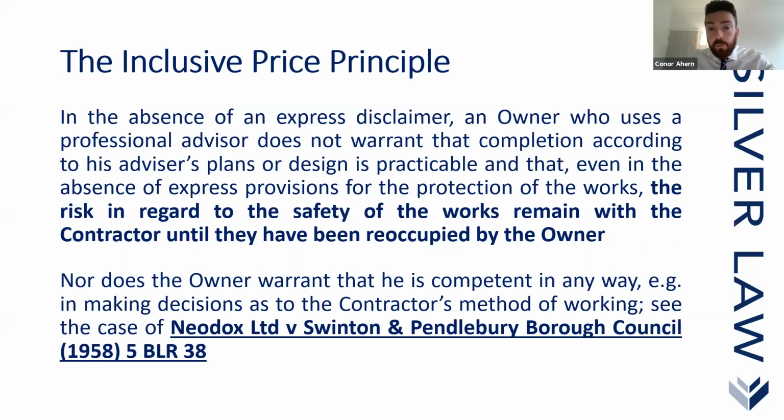He wasn't successful because the alternative method proposed by the council's engineer was completely reasonable in the circumstances. It wasn't for the contractor to decide what his method of working was after the event. If the contractor felt that the method of working was so important to them, then they should have clarified that in the contract. Had they done so, they would have been entitled to the variation.